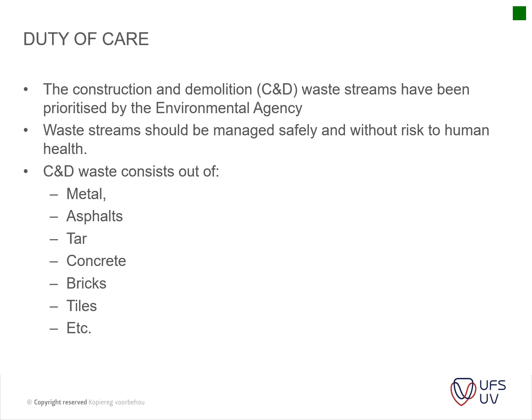If you've got a contractor that has a lot of fill to do and you can use that demolition work there, then you can actually sell it to them. So remember that, don't just pay money and go and dump it at the nearest site. You can actually make money from that.